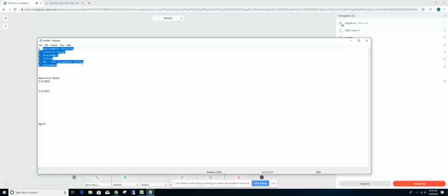Based on the estimates given by the development team and everybody, they will form a project plan. They say, okay, it takes this long, these many developers are working on it, and hence here we can go live. They will maintain the project plan, and they will talk with the project sponsor. Of course, for all these things to happen, there has to be a project sponsor who is spending money on it. So they will work closely with the sponsor and say, based on the requirement and the resources that we have, it's going to take these many working days, these many hours, and hence we might end up paying this much.